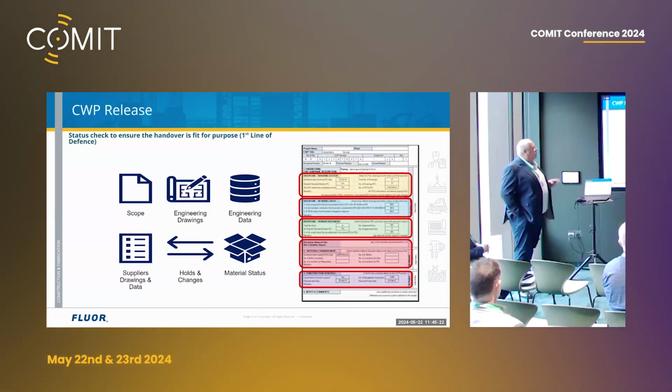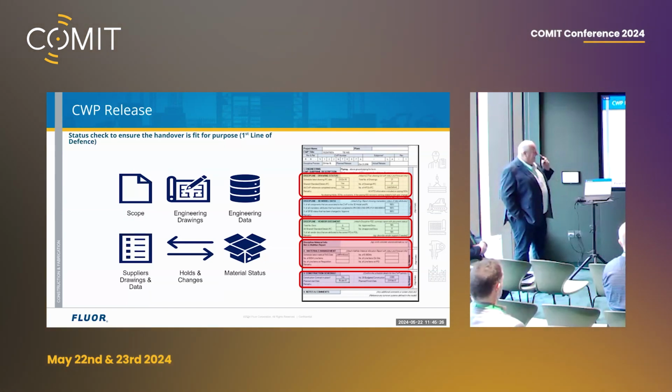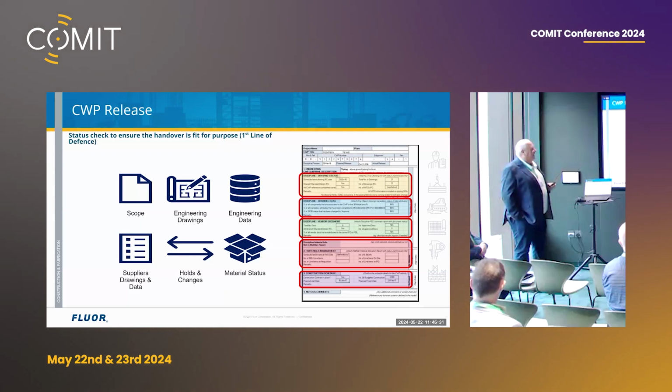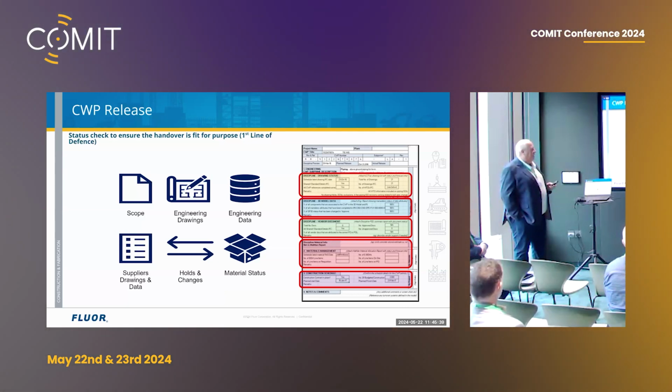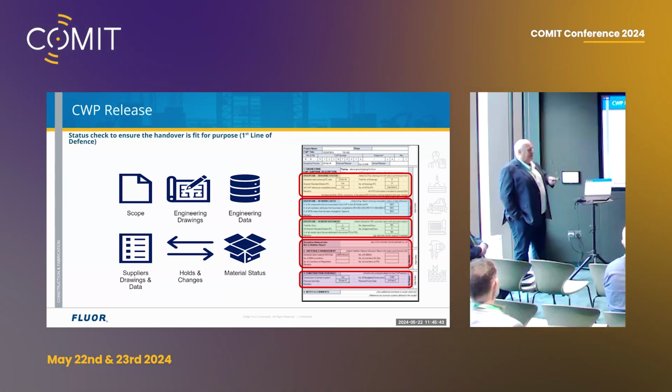So back to our release. We call it the first line of defence because technically when we engineer projects, we want to know all of that information before we hand it over. What is the scope, what we're releasing? It could be one line, it could be complicated, it could be 10 foundations. Have we got all the drawings? Are there any holes? Holes kill us.